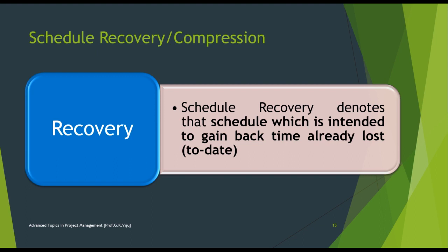Other reasons include the client wanting you to complete the project early, an opportunity to get another project if you can complete this one early, or wanting to launch a product early because a competitor has done so. Generally, you can use one of two schedule compression techniques, fast tracking and crashing, to decrease the project's duration with no change in scope.